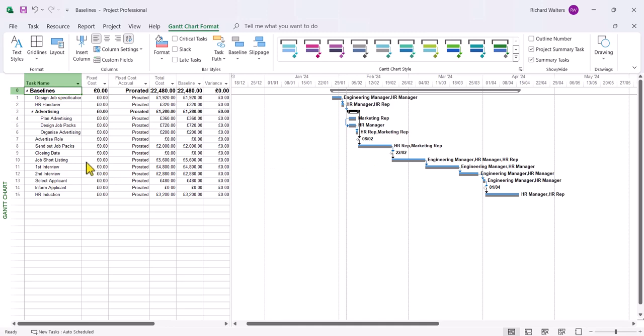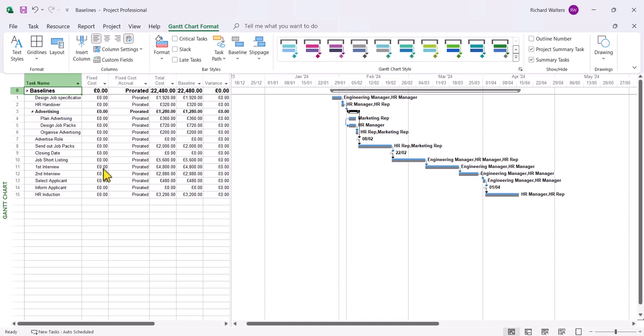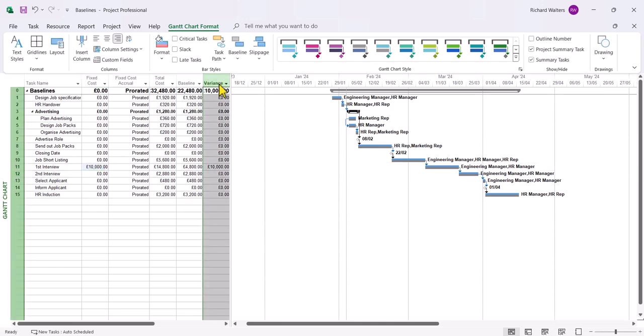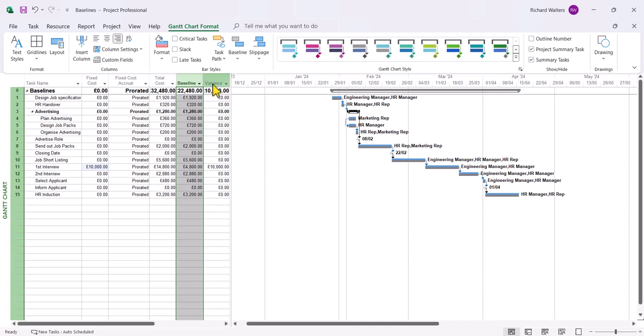So I'm going to put a fixed cost in the first interview. Let's say this wasn't thought of, and I'm going to put in £10,000. This wasn't agreed, it's an extra cost. And we can now see there's a variance. That's an overspend. So our budget is now in play, the baseline. We've now got an extra £10,000 cost. That's an extra £10,000 that wasn't agreed. So when everything is measured and monitored at the end of the project, people might ask questions of why was that needed, or why wasn't it planned for.